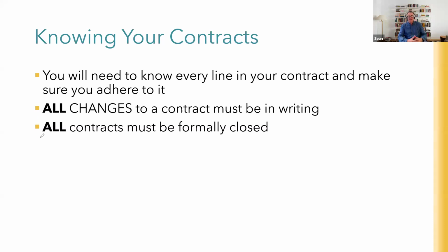But it's always good practice to do an exchange of emails at the end of it to say, look, we've paid all your invoices, you've done all the work. Thank you. Terms of the contract are met, and now it's closed. Those are normal conditions of closure, because there can be abnormal conditions for closure, like non-performance or force majeure or something like that, in which case you will document that. But normally contracted closure, yeah, absolutely fine.